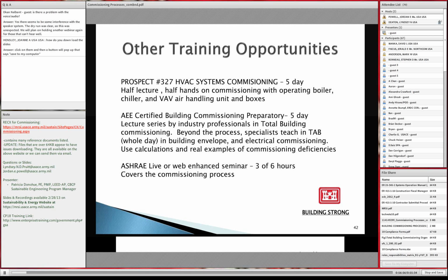We've had 2 people ask. There's been some rumors circulating about rescinding the requirement for the LEED EA3 enhanced commissioning credit. Right now, we do not have any direction from ACSM. We've posed the question. We're working on developing policy. But until we actually get clear guidance that states which portions they want, which portions they don't, our guidance to the field is to continue utilizing enhanced commissioning EA Credit 3 as required on those projects. If anybody has any additional questions, they can feel free to write either myself or Patricia. We can provide any further clarification as needed.